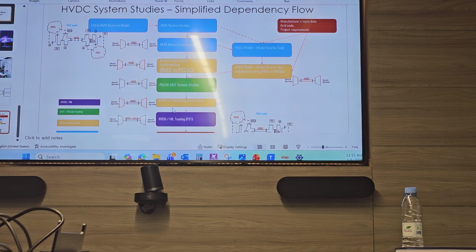So there will be commissioning. It's not like offline commissioning for a relay. It has to be connected to the network and seen there. So while you're doing all this kind of testing, once it's connected to the network, you expect the minimum possible issues. And to do a commissioning test, to connect this, you have to agree with central and south.